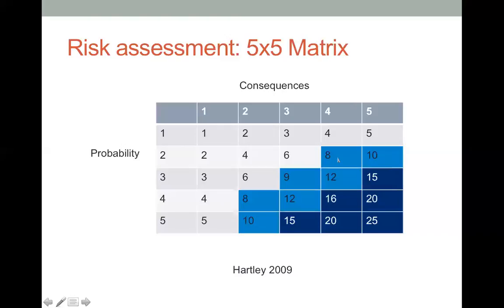Risk that falls somewhere between 8 to 12 will be considered moderate in terms of risk level, so we would normally step in as a project manager to help solve the problem. And the next one is the risk that falls between 15 to 25. This one is considered very high, so this is when we need to get our senior management team to step in.